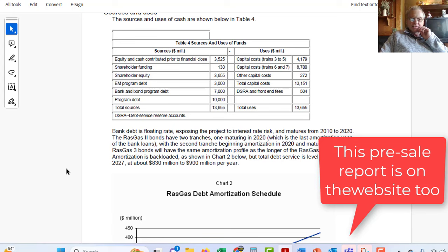Efficiency, same deal. The off-taker is renting this machine, and if you just let it fall apart, it's kind of like the availability. So the whole business is picking things. Fuel price, that's a little different. If the fuel price suddenly goes up in the whole economy, well, the investor cannot control that. So the classic answer is don't take macro kind of risks, because if you took those risks, just like that rental car company, you'd start increasing the price, you'd make downsides, and it would be a really kind of inefficient thing to do.